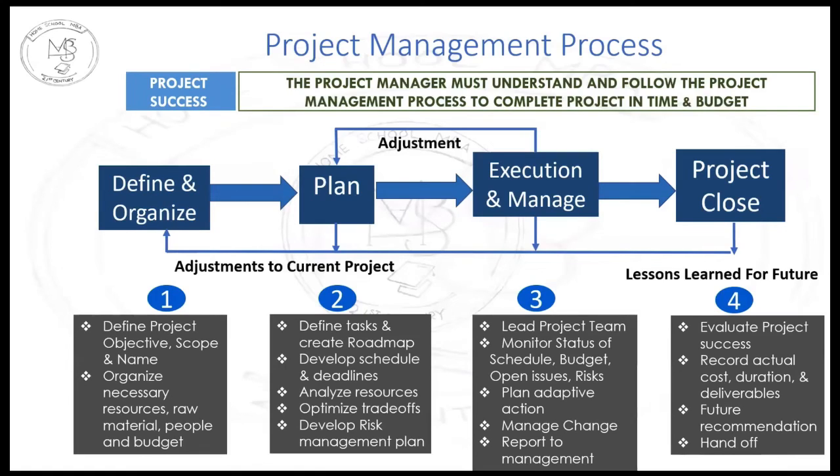One thing I want to add is I've noticed that in a lot of my projects, we really never did a closure or lessons learned for the future. The marketing department or feasibility people would make a project feasibility study at the start of the project, and the project would be 2-3 years long. By the time the project got executed and finished, those people who did the feasibility had moved on.